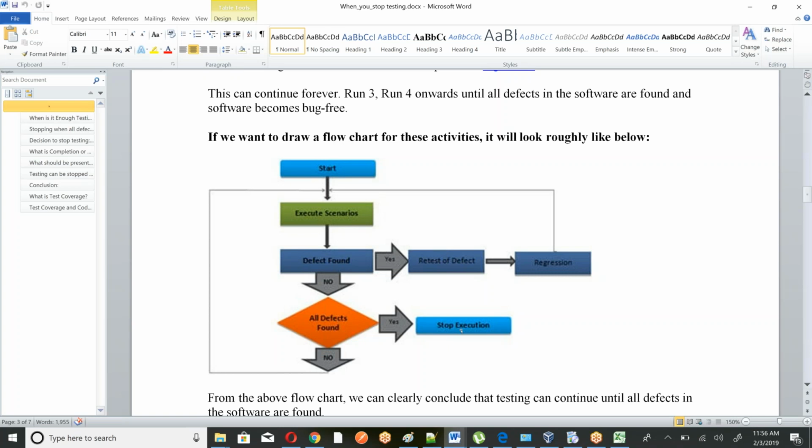Backlog? Not backlog. Suppose they found a major defect and they are not able to fix it within the time. Then they put that user story, that functionality, and drop it from the production deployment. Suppose they're working on 10 functionalities, one is critical with more defects and needs more time, but they will not wait on the 9 functionalities to deploy. They put that one back. They will say, okay, we had a plan for deploying 10 functionalities.